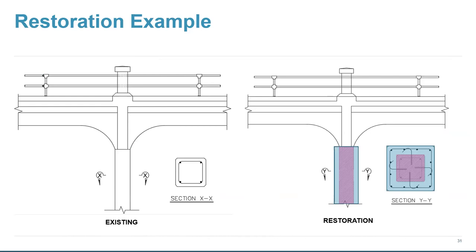Well, essentially CEQA is the California Environmental Quality Act. And essentially when you get a building like this, CEQA considers the building as part of the environment. And so to remove a building like this, there would be significant mitigation required. That's where all of the legal stuff comes into play. And I think Jason, our environmental consultant, can chime in here.